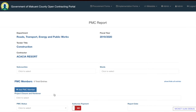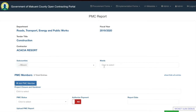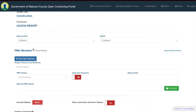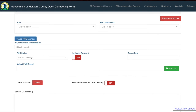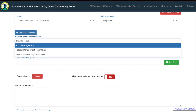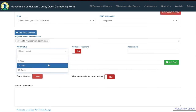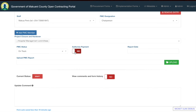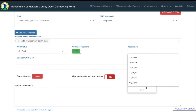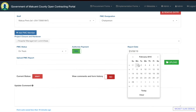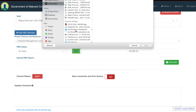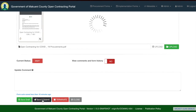The PMC report allows you to save the different sub-counties and wards, which you can add multiple of, and to choose the PMC member. Ensure you have added the PMC members in the metadata in the header before adding them here. You will select the PMC member, the PMC designation, and the project closure handover. The PMC status options are: at risk, on track, or off track. You also indicate whether the PMC committee accepts and authorizes payment, add the report date, and upload the PMC report.